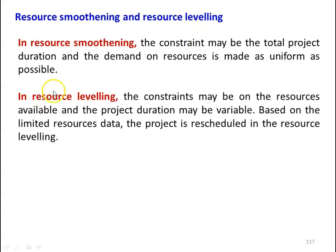The definition for resource smoothening: in resource smoothening, the constraint may be the total project duration, and the demand on the resources is made as uniform as possible. In the PERT-CPM network, we calculate the TE and TL values and we calculate the total project duration. In resource smoothening, the project duration you cannot alter — you cannot change the number of days for completion of the project. Every activity requires resources: man hours and materials. We have to adjust the demand for resources and make the demand as uniform as possible.